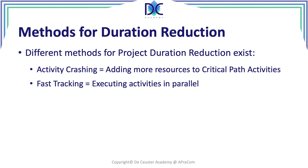Activity crashing is adding more resources to critical path activities. When we add more people to complete an activity, the duration of that activity will be reduced, and when we do that on critical path activities, the duration of the project will be reduced also.